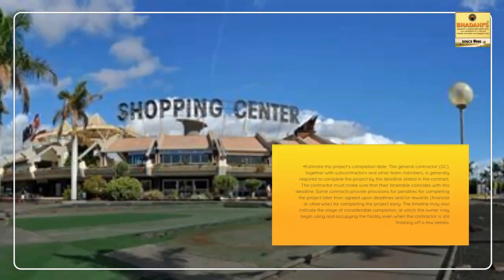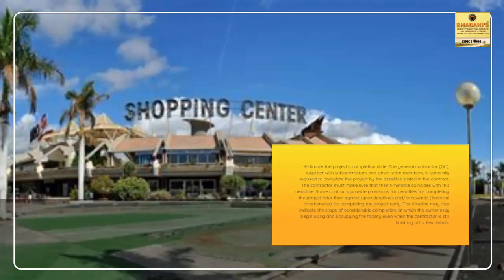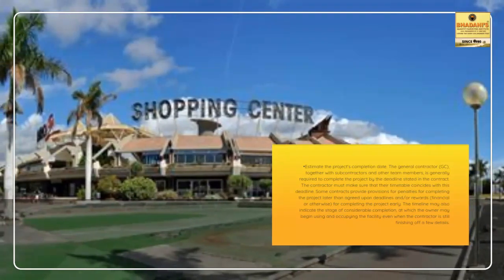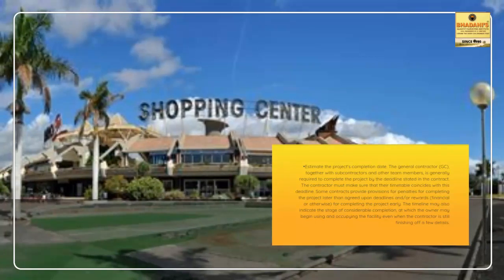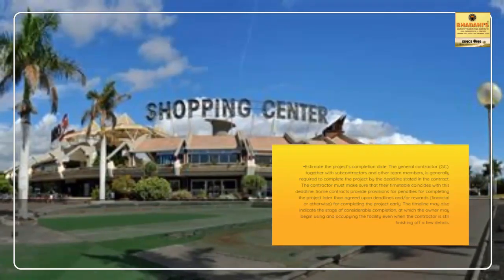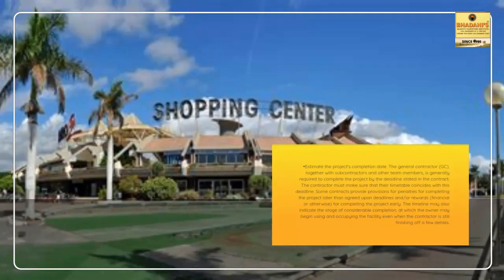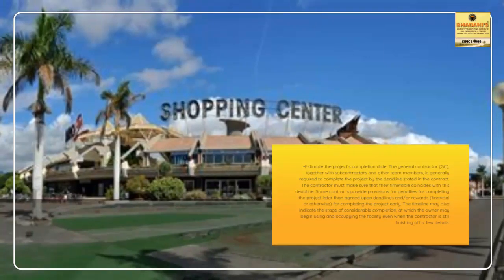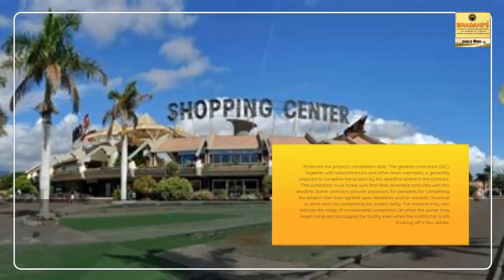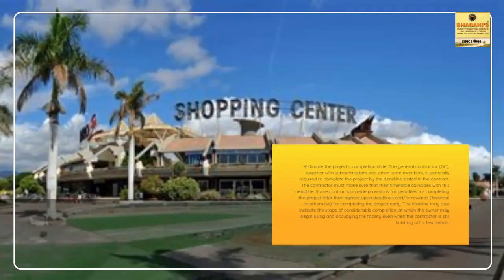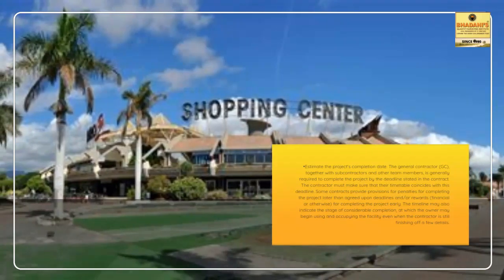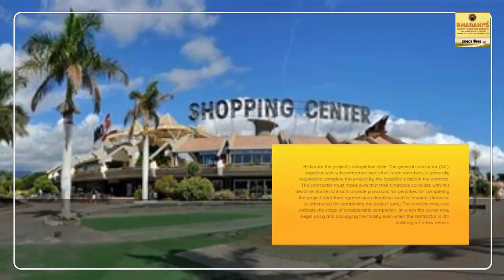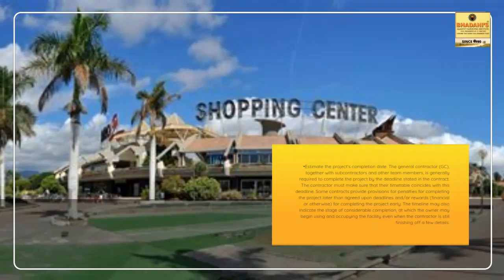is generally required to complete the project by the deadline stated in the contract. The contractor must make sure that their timetable coincides with this deadline. Some contracts provide provisions for penalties for completing the project later than agreed-upon deadlines and or rewards, financial or otherwise, for completing the project early.